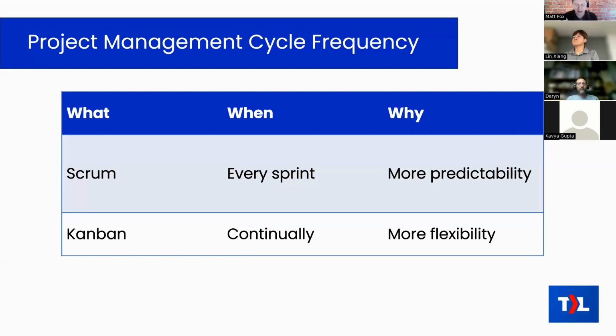Okay, a sprint is a period of time that you choose as a team. Different companies or different teams might have a different sprint length. 1 week or 2 weeks is the most common. So you split your time into periods of 1 week or 2 weeks, or what you might choose. And within that, at the beginning of the sprint, you select the tickets that you want to get done for that team for that sprint, whether it's a week or 2 weeks or whatever. That's supposed to stay fixed during that sprint. You're not supposed to be removing certain tickets from that or adding new ones.